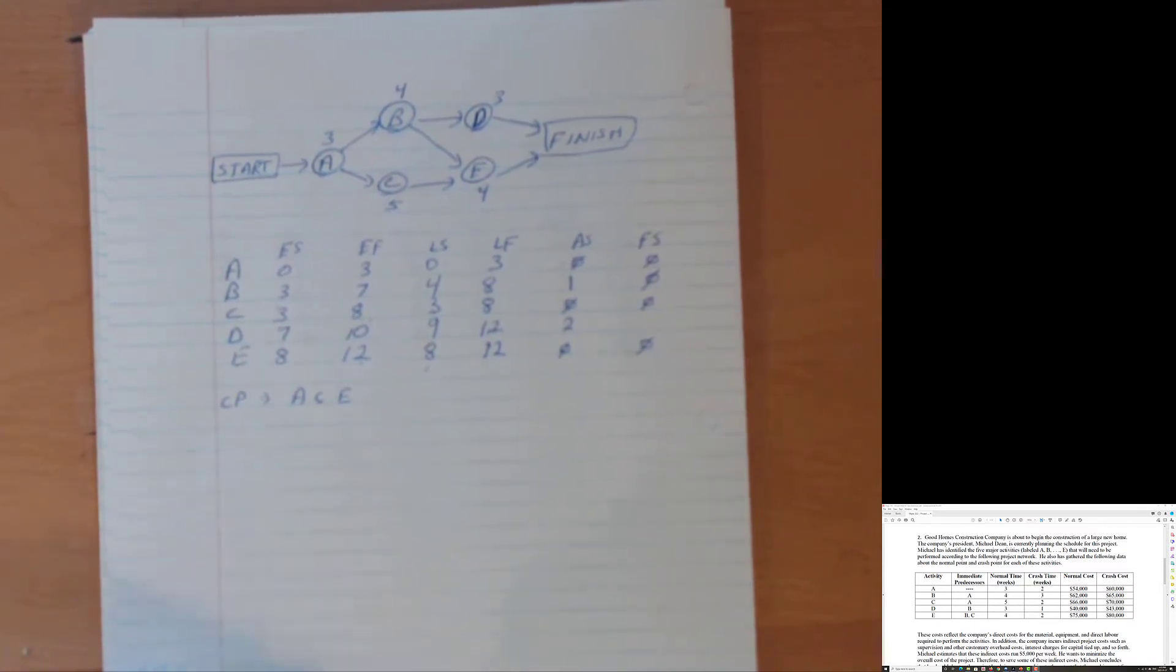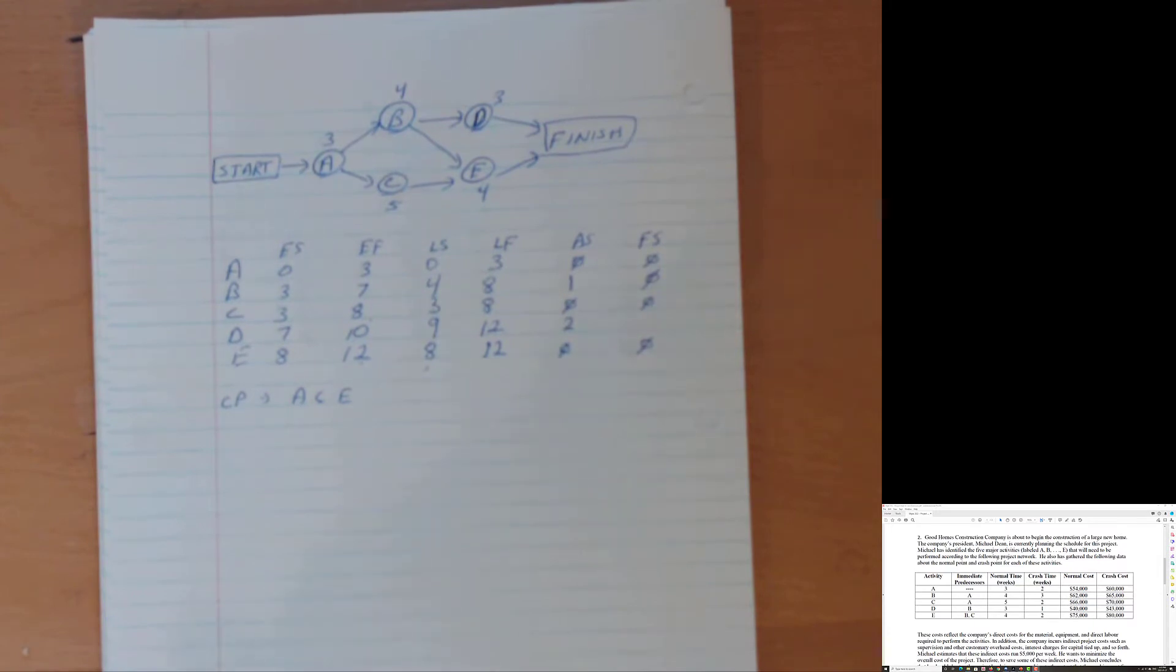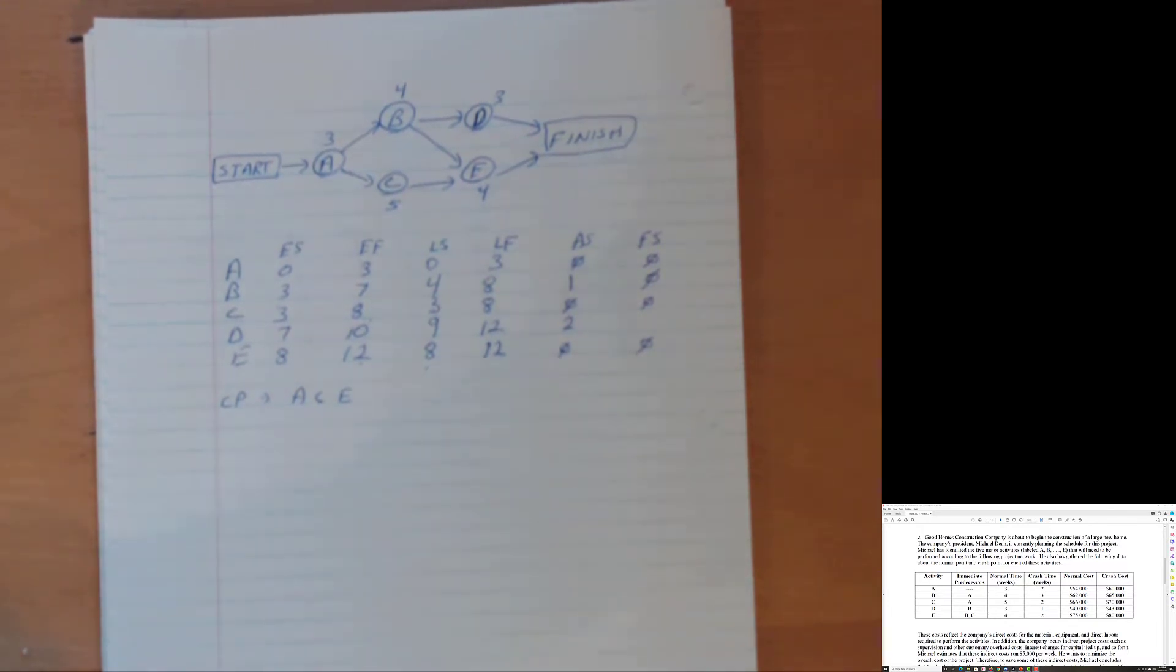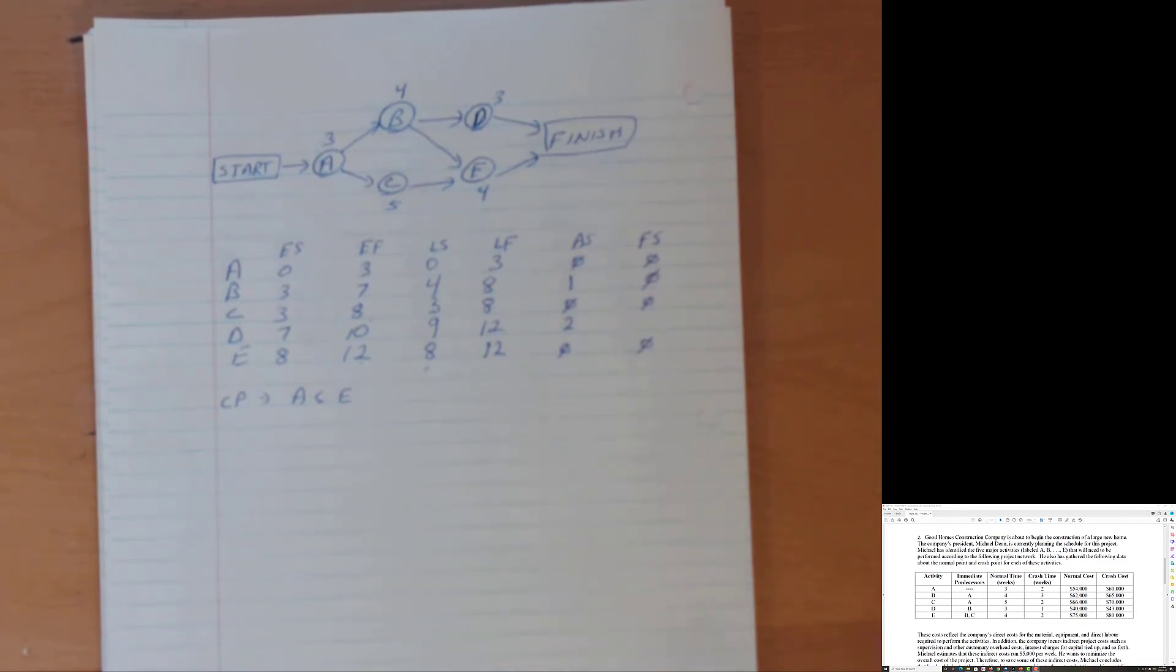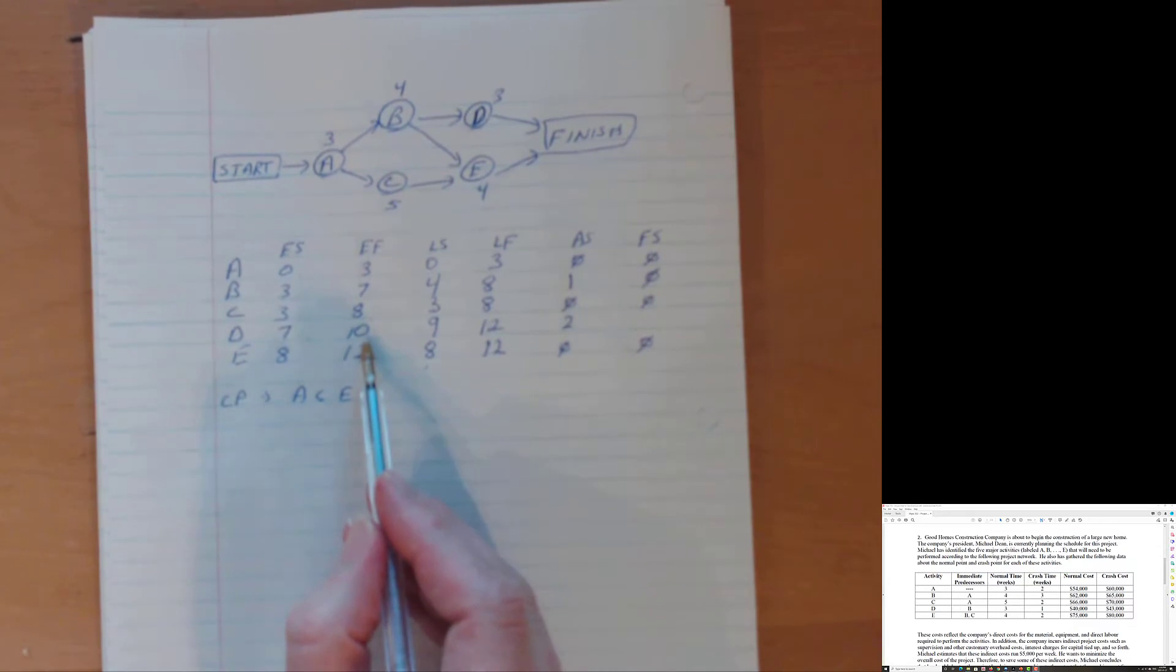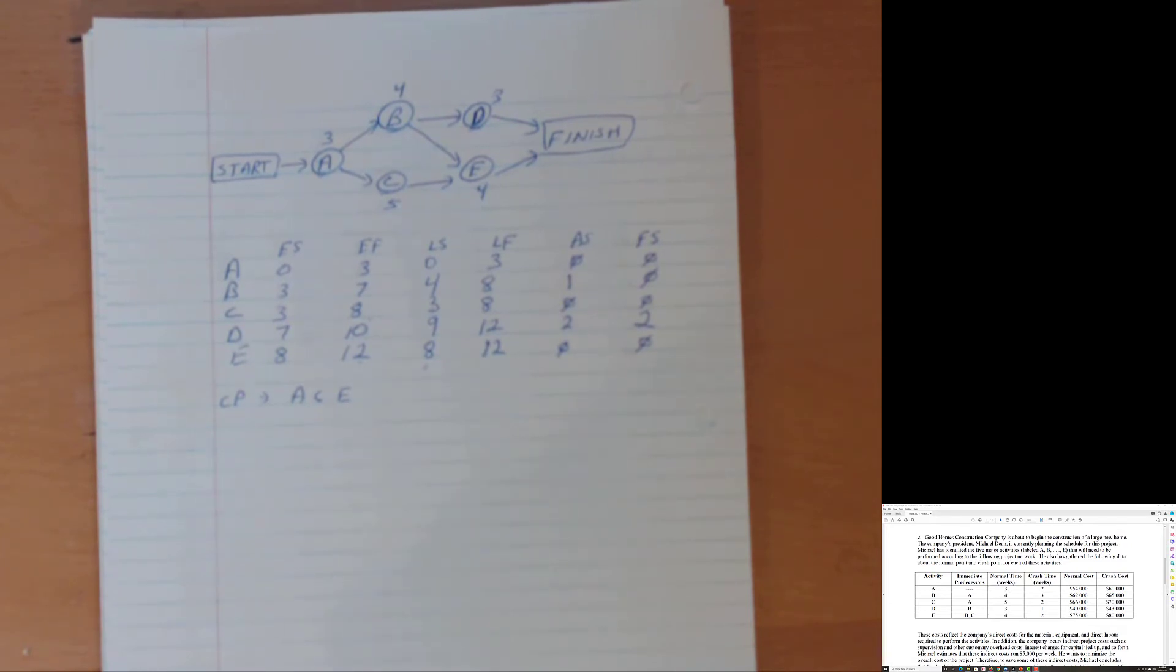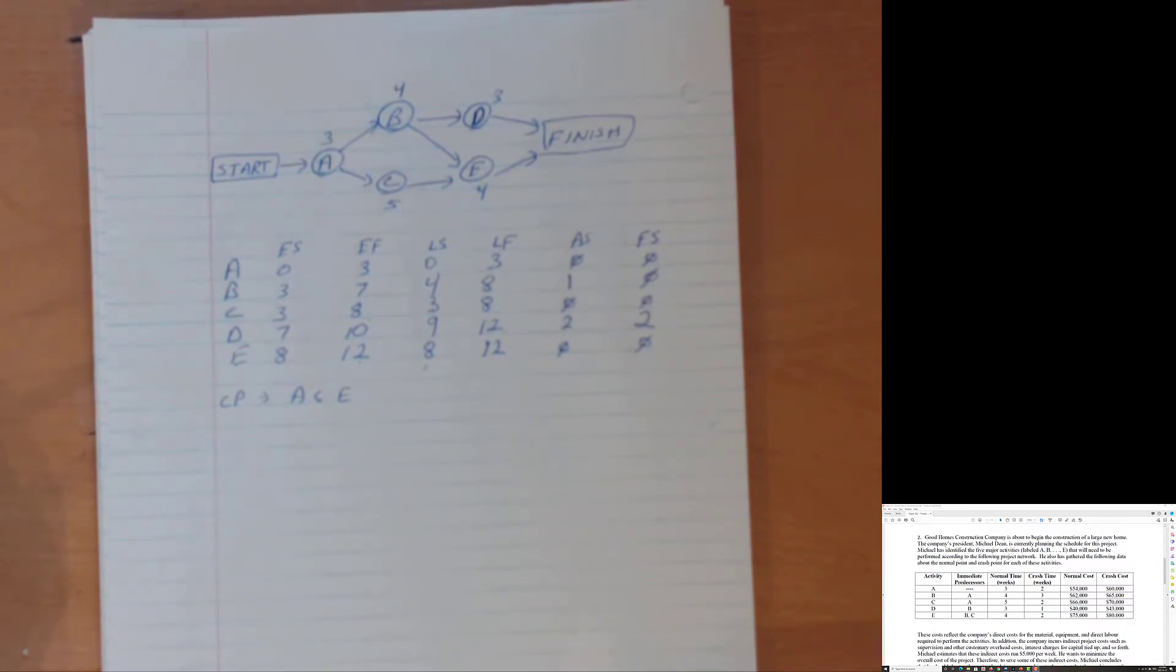Now D, however, D's last activity or earliest start of the next activity is the finish. The finish is, I guess, by definition on the critical path. So kind of suspecting activity slack and free slack will be the same, but let's double check. So we look at the earliest start of the next activity, which is the finish of the finish of the project, which is week 12. And we go minus the early finish of the current activity, which is D. So 12 minus 10 and we get two. So we've confirmed that we're somewhat happy with that. So that knocks out some of our issues here.